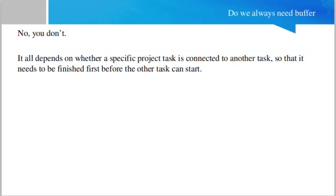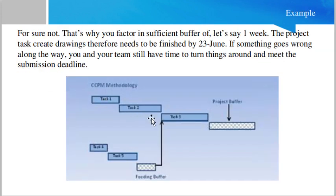So the main concept is: take task 1, task 2, and then there is a 7-day buffer at the end. If anything goes wrong — the engineer gets sick, is unavailable for a day or two, or any emergency happens — you still have those 7 days of buffer, and your project will not be delayed because of that activity.